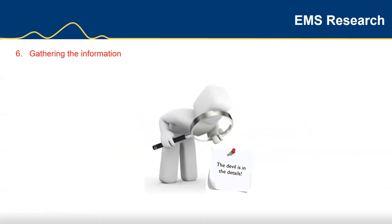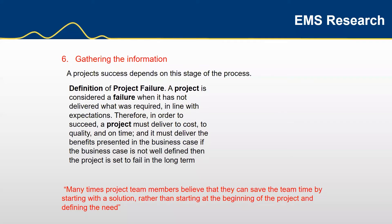Now that we have a brief outline of the URQ, URS, and an overview of how to manage the project, let's take a deeper dive back into the procurement stages. It is crucial to gather the right information as each EMS is unique — as they say, the devil is in the detail. You could have a situation where the facility is not even built yet, and in fact, it's the best time to be involved in these early stages rather than coming on board when the facility is already built. It's really important that the customer does their research. Ask your management to provide a budget and a research team — leaving such an important project on the shoulders of one person is not the way to go. The EMS should be clearly defined and the team should be fully aware of the strengths and weaknesses of each vendor's offering. I would recommend comparing several vendors and coming up with a shortlist based on a risk assessment.